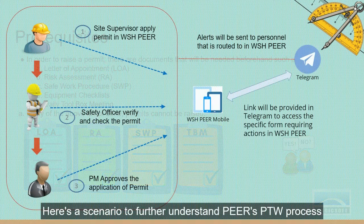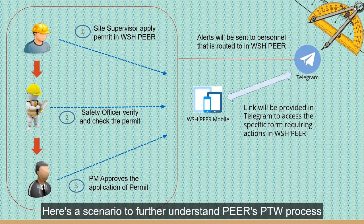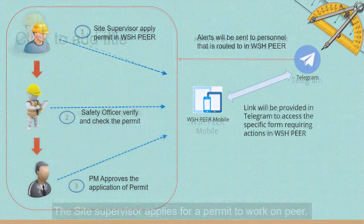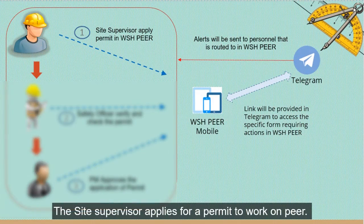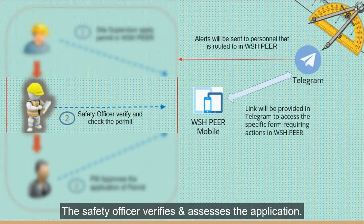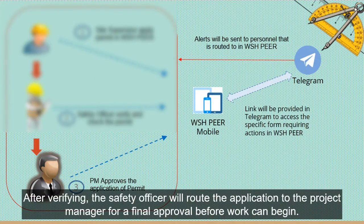Here's a scenario to further understand Peer's PTW process. The site supervisor applies for a permit to work on Peer. The safety officer verifies and assesses the application, then routes it to the project manager for a final approval before work can begin.